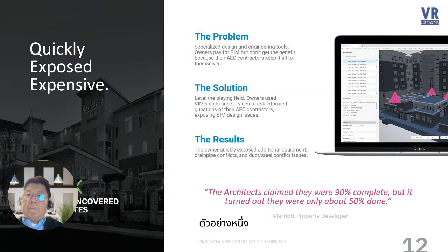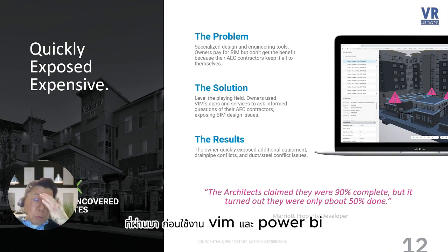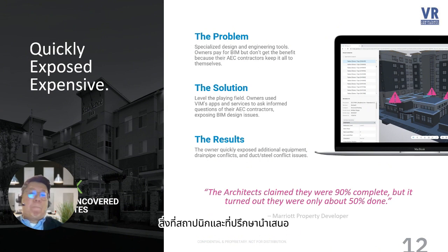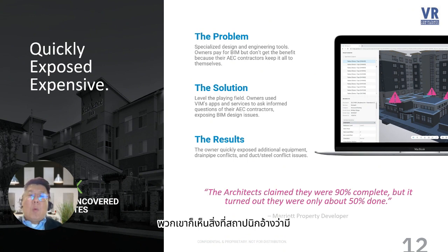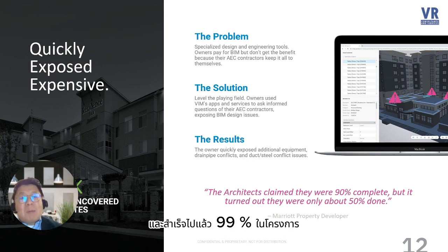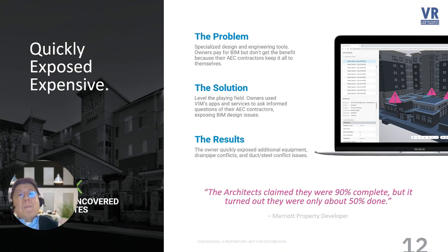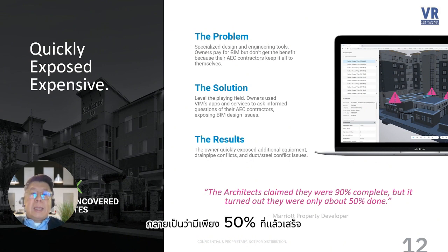One typical example is from one of our clients, Marriott Property Developer. I think it's well known as a hotel operator, hotel owner. In the past, without using BIM Power BI reports, they would just take what the architect or consultant proposed. But after they used the BIM Power BI reports, in this scenario, you can see that when the architect claimed they were 90% completed in the project, after reviewing through these Power BI reports by BIM, it turned out only about 50% done.